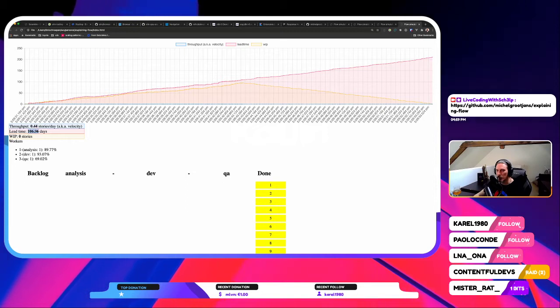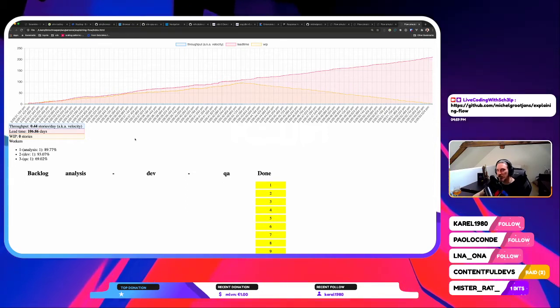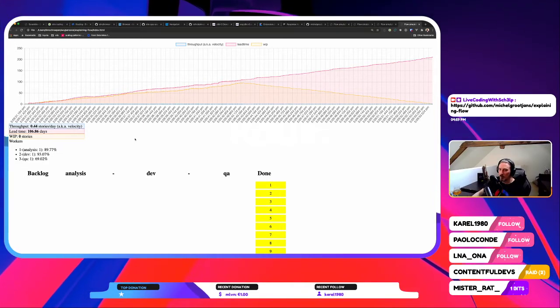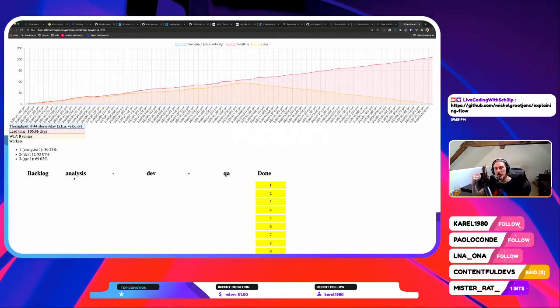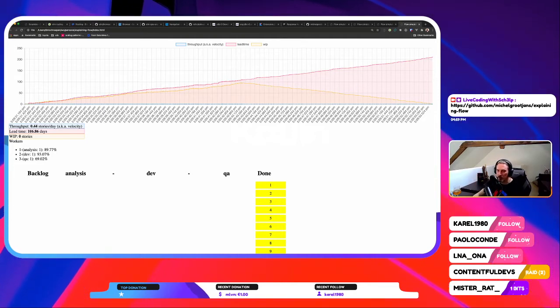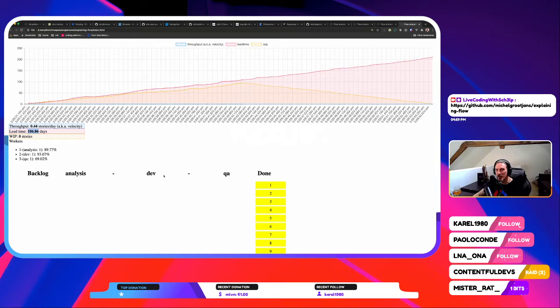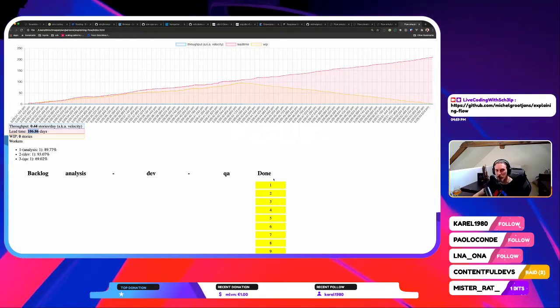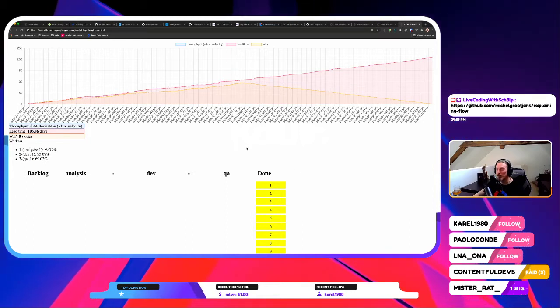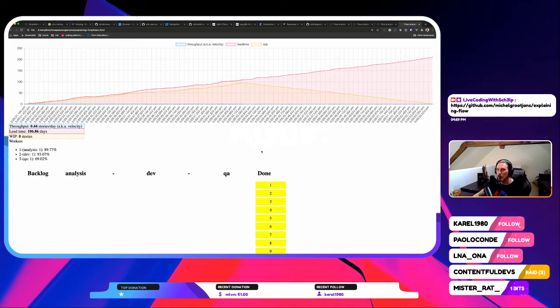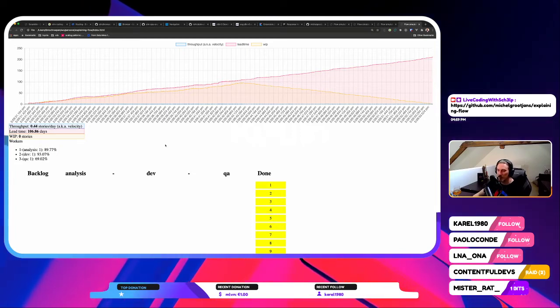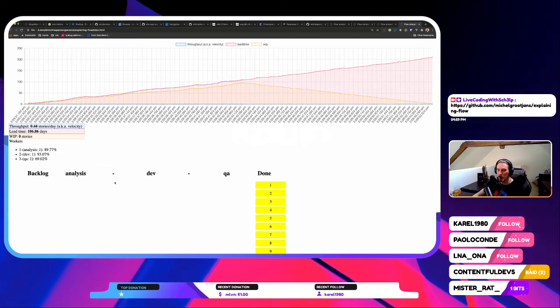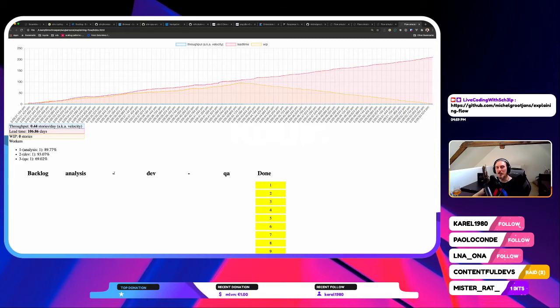And in fact, if you just look at the metrics, we've got a lead time of 106 days. So that means the moment one item of the backlog is being pulled into the system of a team, it'll take generally 106 days until business learns about the impact of that work item, because that's how long it will take until it's moved into done. So I don't think business is going to be happy with a process like this. So what will they typically do? They'll see, well, obviously the problem lies with the developers, because have you seen the amount of work that they can't do, and it just keeps on piling up.